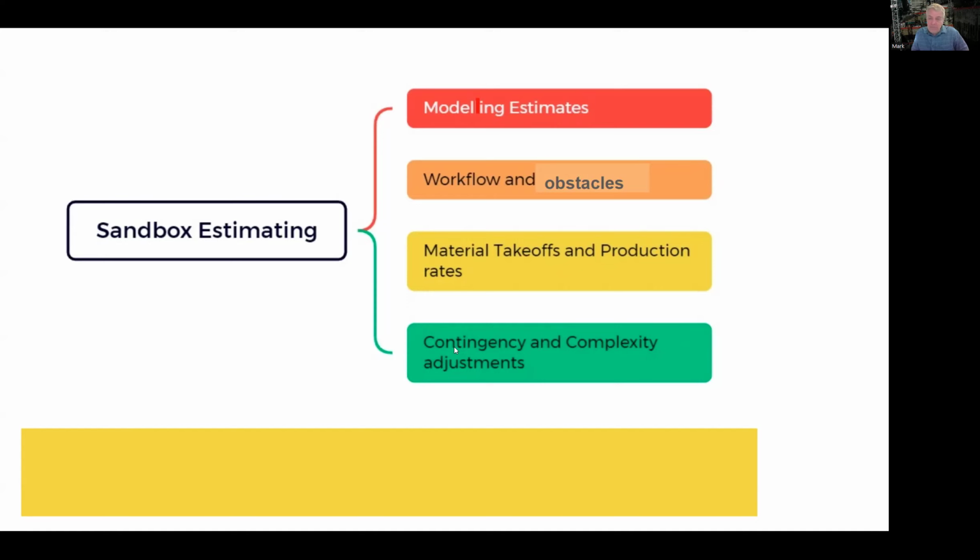But if it's raining, weather might be a factor. So there's all sorts of things that you put in there. Essentially, it's a catch-all for some extra cash. If you do it well, the contingency becomes your profit, or it can become a discount to the owner of the project. There's things to think about. All right, that should cover it.